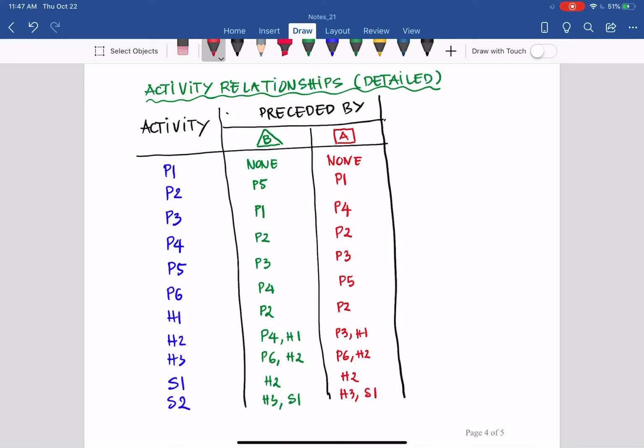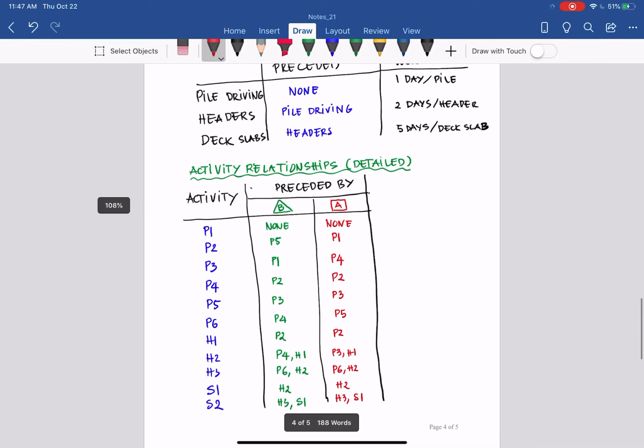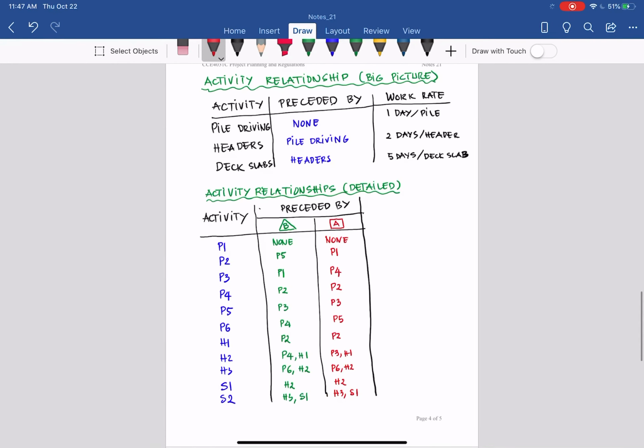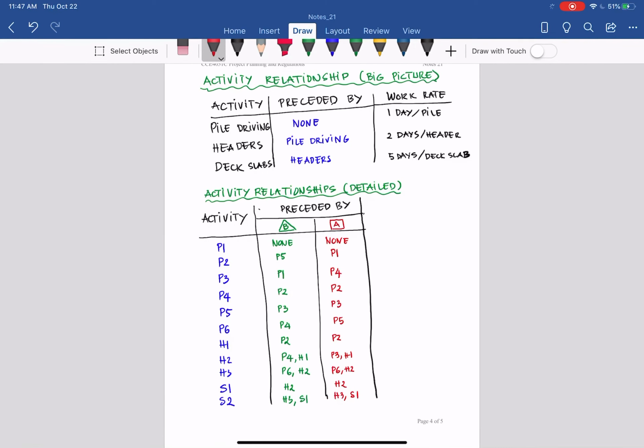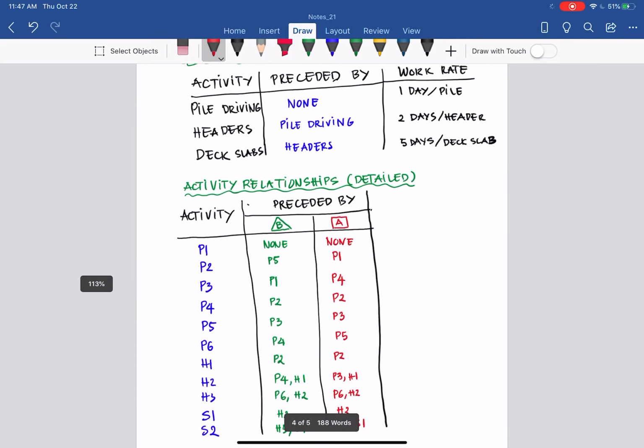The sequential row pile driving, the green one, will take this whole pier to complete in 18 days. But if I use alternate row piling, the red one, it will take 16 days. So we will get back to that. But as you can see, if we make a good plan, actually we can move from 22 days to 18 days and to 16 days. So that is amazing.